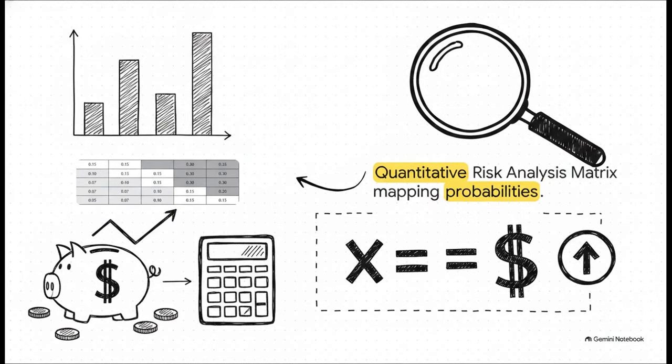And why does this matter? Well, mathematically calculating that expected loss gives you a very real, very justifiable number to use when you go to establish your project's contingency funds.